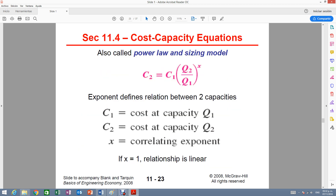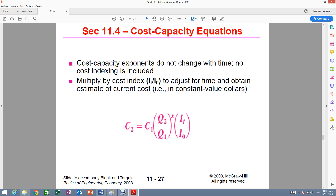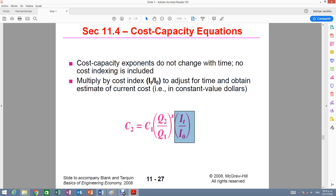This is the basic equation, but in this problem we are also given the index. There is a modification to this equation on slide 11-27. It is the same equation but adds the indexes from example 11.2. That means you are not only accounting for the cost capacity relationship, but also adjusting for the change in capacity and price over time. The index ratio provides the time adjustment. This is the formula we will use to solve example 11.4.